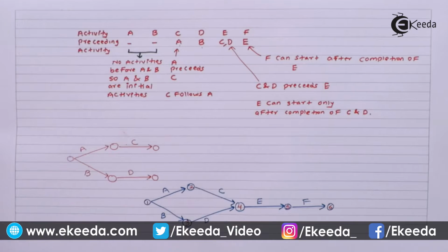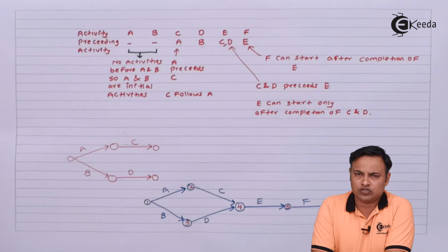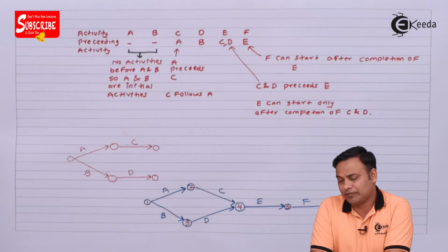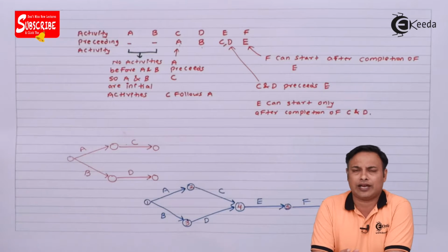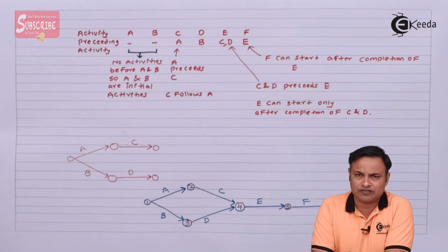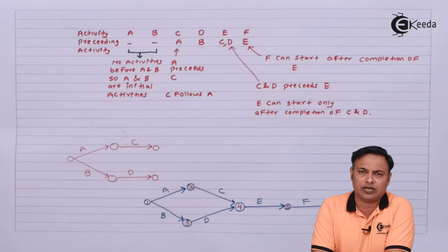Arrows are moving forward. There is no condition that your diagram should be symmetrical or have a particular shape. It may happen that the same diagram may be drawn in a different shape. What's more important are the connections. You must satisfy the connections between the different activities rather than looking at the shape of the diagram.